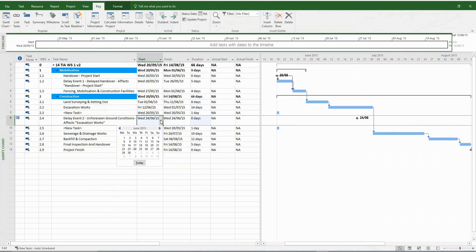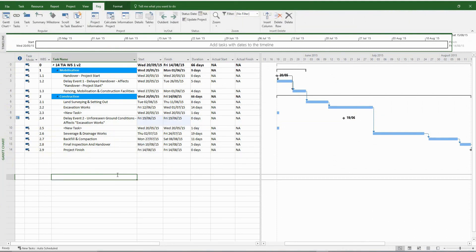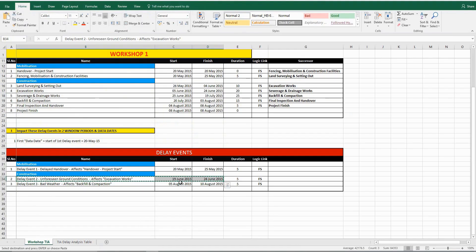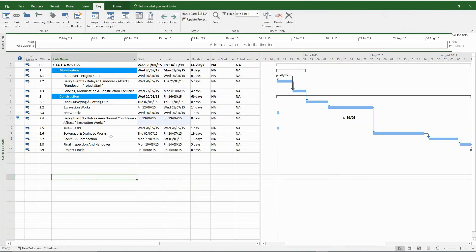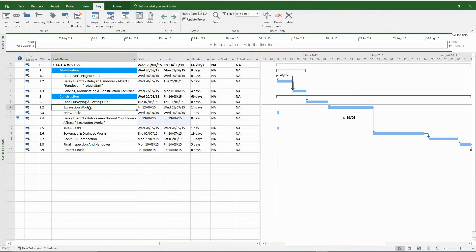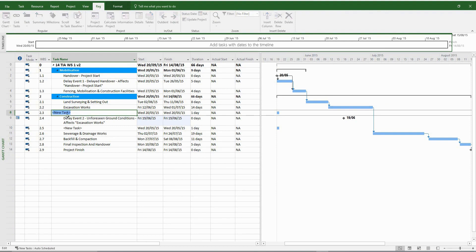This is what differentiates a time impact analysis from an impacted as-planned analysis. In other words, time impact analysis takes into account the current situation on site, and the overall assessment is done in a contemporaneous manner. Before you introduce a new delay event, update the current program and take into account any delays or gains to the previous update of the program.